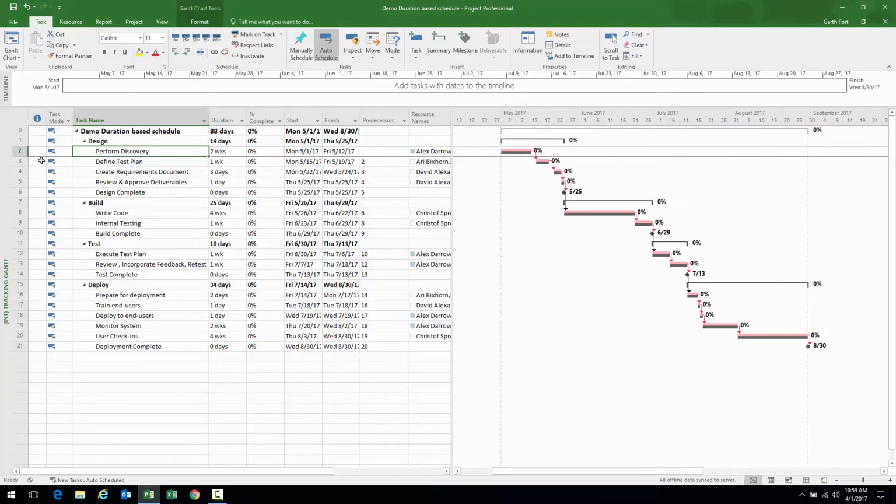The scenario being, I spoke with my team. We were working on the design stage. And it depends on how often my status meetings actually are. In this case, this task is 2 weeks long. If my status meetings are every week, theoretically, I should only be statusing this one task because it's 2 weeks in duration. Therefore, if I'm 1 week into this project, hopefully I'm 50% complete.